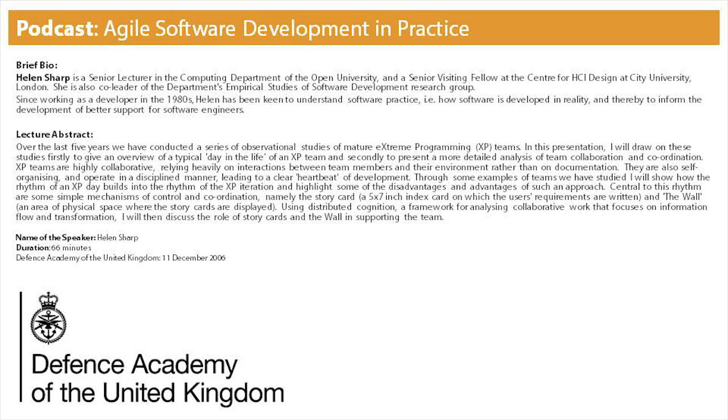One of the teams had a split stand-up because they had developers, but they were also working with business analysts. So they'd have a stand-up of about 5 or 10 minutes for developers, and then the business analysts would join in for the second 5-7 minutes. There are different ways that people run these meetings; it depends on your situation, the team and who's involved. But the idea behind the stand-up is to report on yesterday's work, to identify and communicate to others any issues or problems people have come across, deciding what to do next, and choosing pairs.